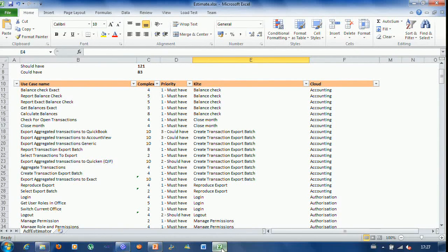if you model this out and export it, for instance, to an Excel spreadsheet, which is this one, you will see that you will get an immediate estimate for your project. And you can do that right at your modeling session, which makes it really powerful. So if you're modeling with your customers, and they ask, how big is the project up till now? If we had, I don't know, 3 out of 4 of these sessions, you say, I'm just going to generate the spreadsheet for you, and here's the estimate.